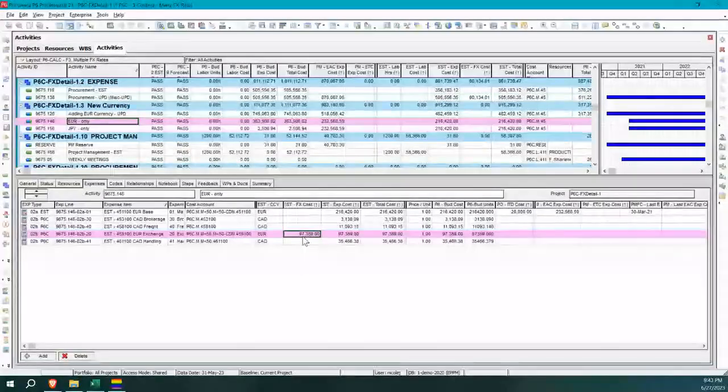Now that's hugely important because if you are doing a lot of projects around the world, you want to be able to go out and procure different exchange rate currencies, try and get the best exchange rate you can, and you want to be able to do that in bundles. Okay, so this helps forecast what kind of currencies you're going to need, how much, and when, because we've got the timing of these projects on the activities. So that's a big one.